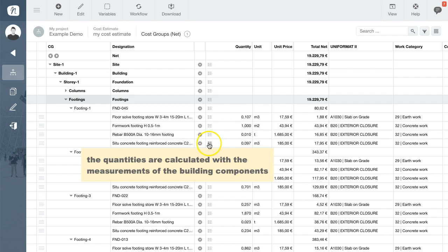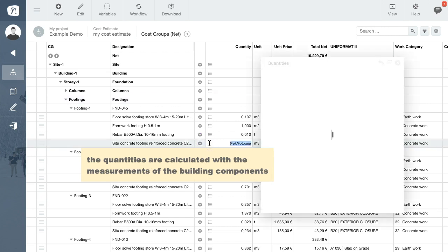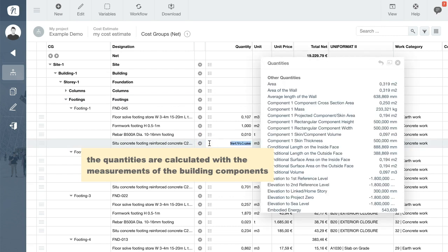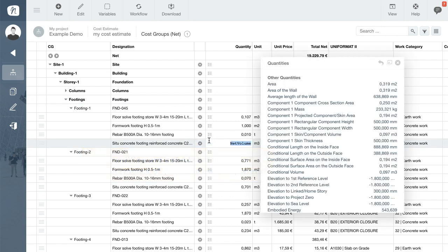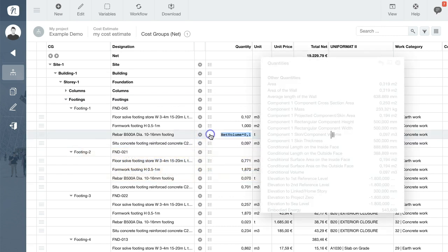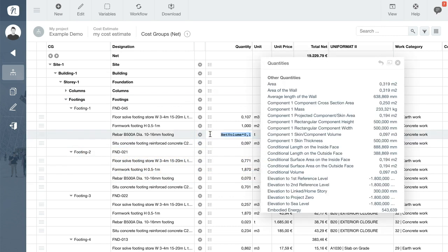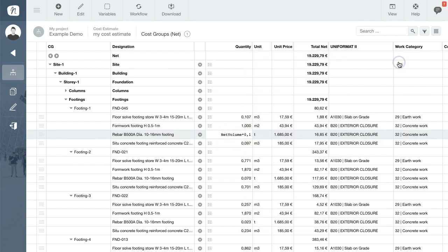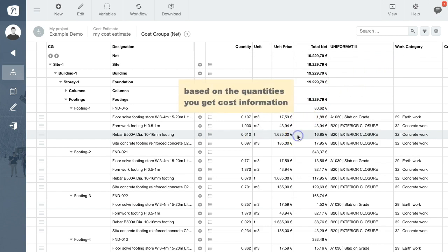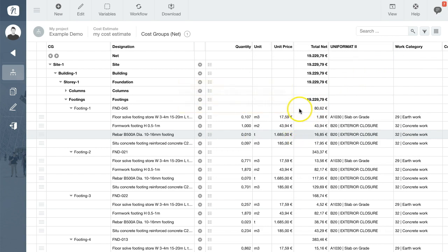The quantities are calculated automatically on the basis of the measurements of the building components, applying any variable and formula. Combined with the rates or unit prices, instantly providing you with detailed cost information at every level of your project.